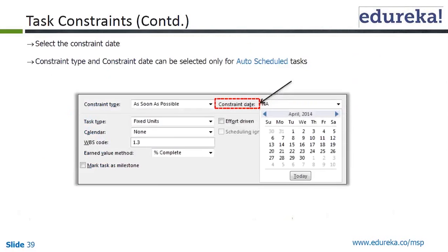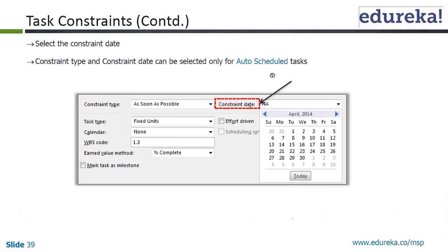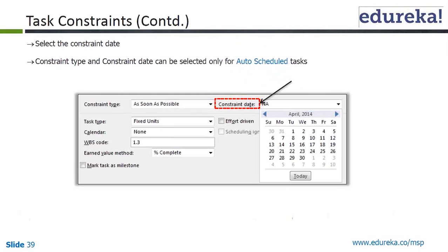As Soon As Possible is the constraint type selected here. The constraint date can be selected only for auto-scheduled tasks. Please note this cannot be done for tasks which are not auto-scheduled. Since all of the dates we have so far are auto-scheduled, we can put the constraint date.